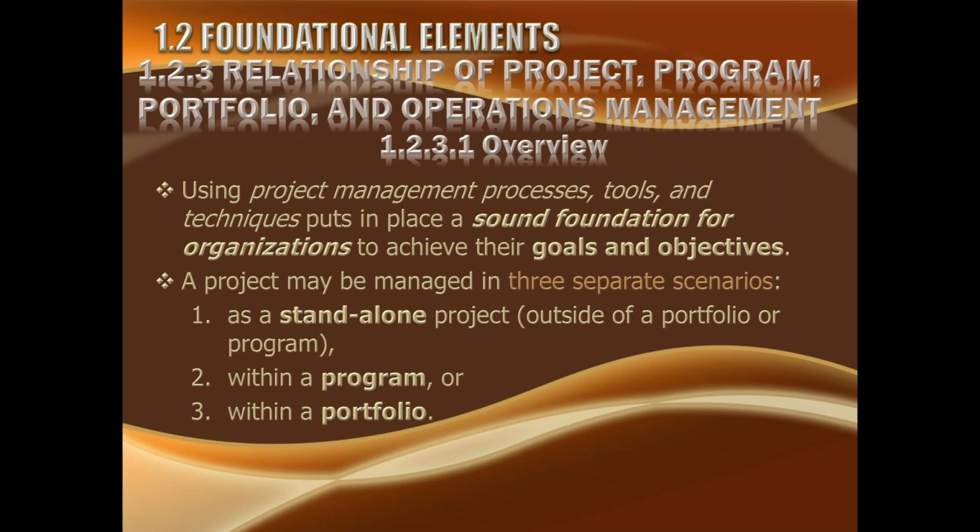But if this big mega project is still targeting the product and not the outcome or the benefit, then it will always be called a project, no matter how big this project grows to be. But when it grows into an entity which does not care about the product, but is focused solely on the benefit realization or the outcome, this is what we are talking about as a program.